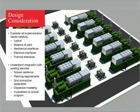Moving on from that initial feasibility phase, what becomes equally important are the complete design considerations. Clearly, it's not just the engine and generator that will provide the levels of savings advised during the feasibility stage, and it's important to understand the complete balance of plant. With regards to layout, we're talking about integration into an existing facility. It may be a Victorian boiler house in central London, which may have its own perks, nuances and difficulties in terms of how we would deliver the project. It might equally be a greenfield site in Africa where we haven't got concerns with regards to layout or clashes with other equipment.